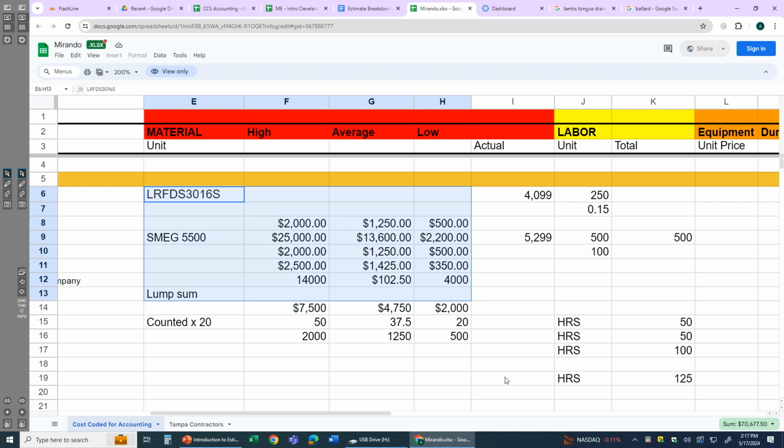It might make sense, instead of adding escalation like we talked about, say you have copper pricing, to just show a range. Give a high price per square foot, or however you order, maybe in tons. I'm not sure how you order it, but give a high, give a low, and give an average. It's okay to include that in an estimate, and just show in your assumptions that I've included average costs based on the range.